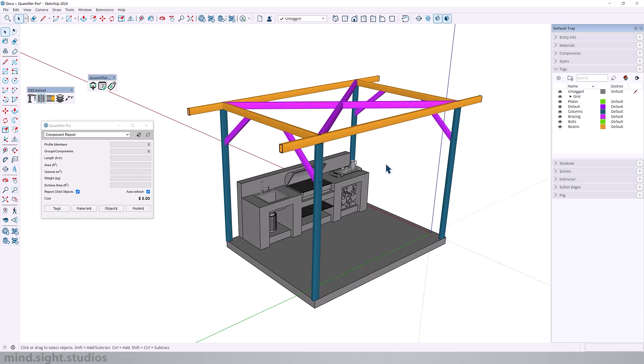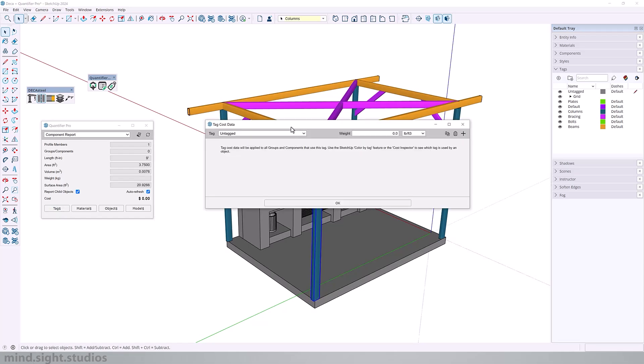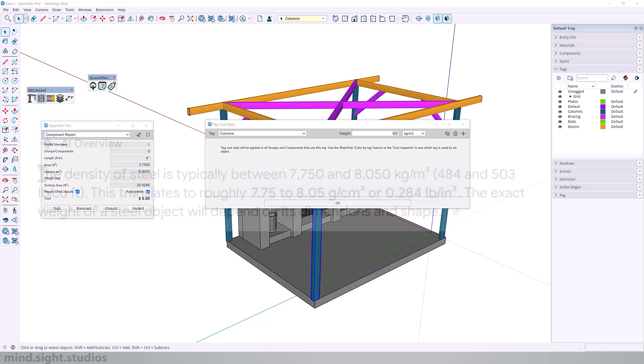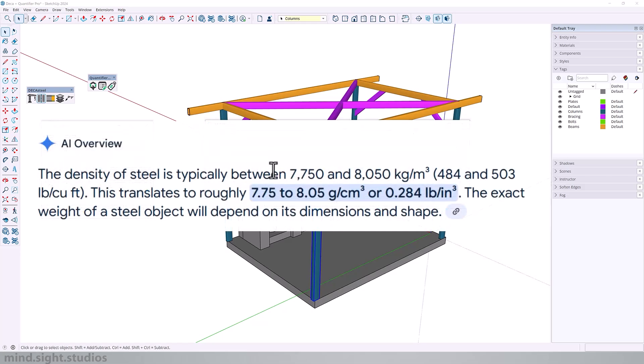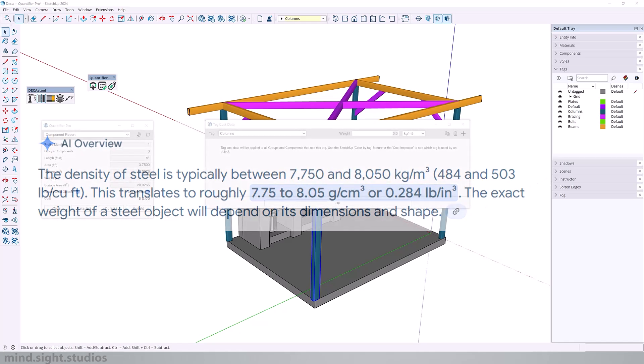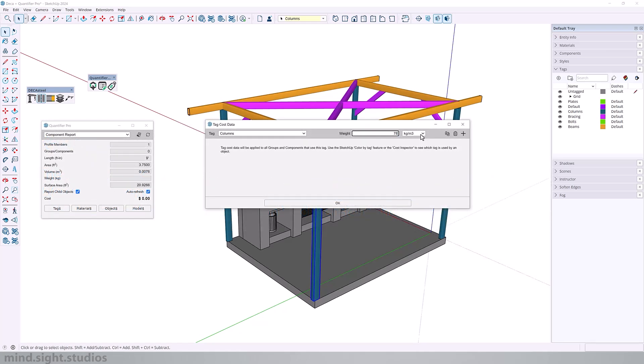So I'm going to select one of my posts, and I'm going to click on tags. From our options, we can select columns and our unit, we're going to pick kilograms per cubic meters. And here we get to add the density value for steel. And if we check online, the density of steel falls within this range. So we're going to use 7850 kilograms per cubic meter.